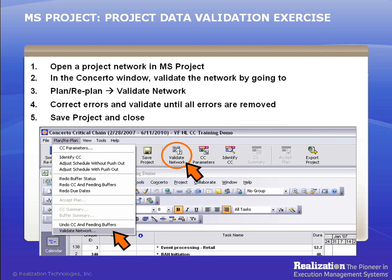Every task has a resource assignment. Fractional unit assignments are allowed in 0.05 unit increments; however, this is not recommended because it implies multitasking. There should be no duplicate resources in the Concerto Resources sheet. To validate a project network, simply click the Validate Network icon button. You can also select it from the Plan/Replan menu. If there are warnings or errors, validation will prompt you for corrections. A warning message does not require immediate action; however, error messages will cause the validation to fail and require that you fix the errors, such as a missing resource assignment for a task.